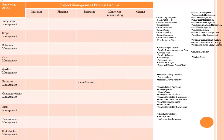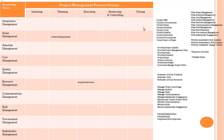Now we will see collect requirement. Collect requirement means we are planning. Requirement is the part of scope, so it will go to scope management. It comes under planning process group and scope management knowledge area.